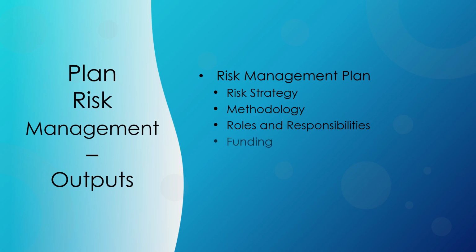The funding identifies the funds needed to perform activities related to project risk management. It establishes protocols for the application of contingency and management reserves. The timing defines when and how often the project risk management processes will be performed throughout the project lifecycle and establishes risk management activities for inclusion into the project schedule.